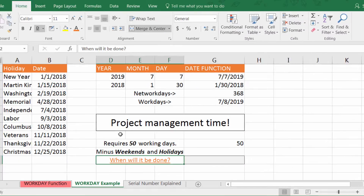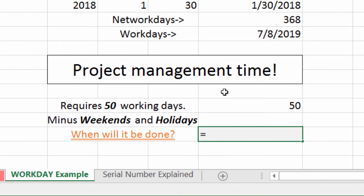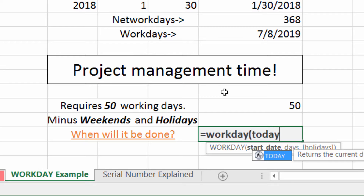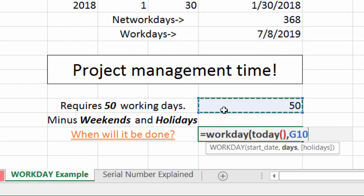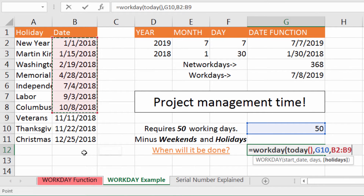Moving on, I have set up an example here. Workday is best buds with project management. I have a classic project management question — it requires 50 working days. I'm just going to assume we're starting today, so I'll enter 50 days, then a comma, then holidays. So what days am I going to take off? Let me select that here.